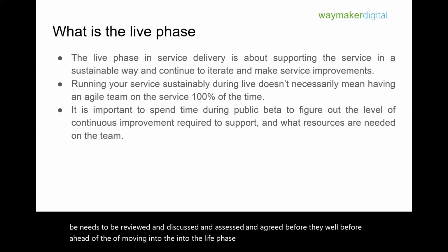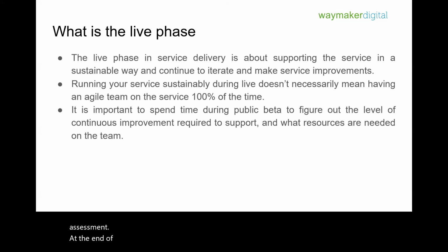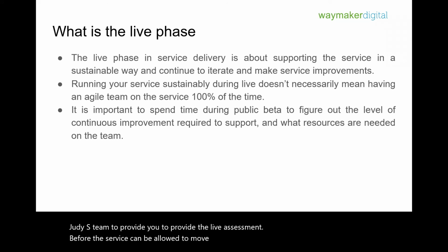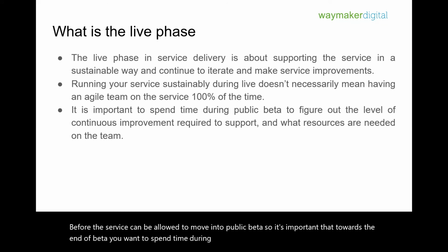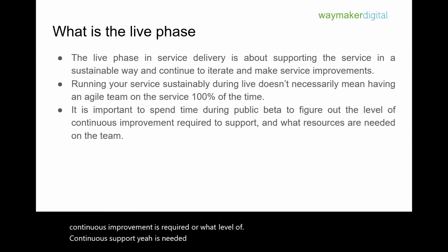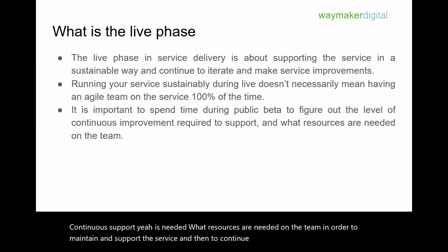Also, there is a live assessment at the end of the public beta phase that needs to be attended by the service, and you need the GDS team to provide the live assessment before the service can be allowed to move into live. So it's important that towards the end of beta, you spend time during the public beta working out what level of continuous improvement is required, what level of continuous support is needed, and what resources are needed on the team in order to maintain and support the service,